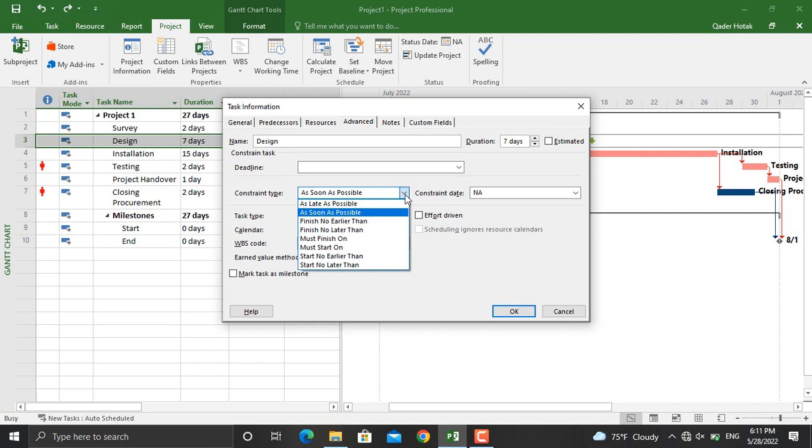As Late As Possible, which means that as late as you can, this activity will start. The next type of constraint is As Soon As Possible. This is usually used by Microsoft Project by default, which means that as soon as the predecessor activity is completed, the successor activity will begin.